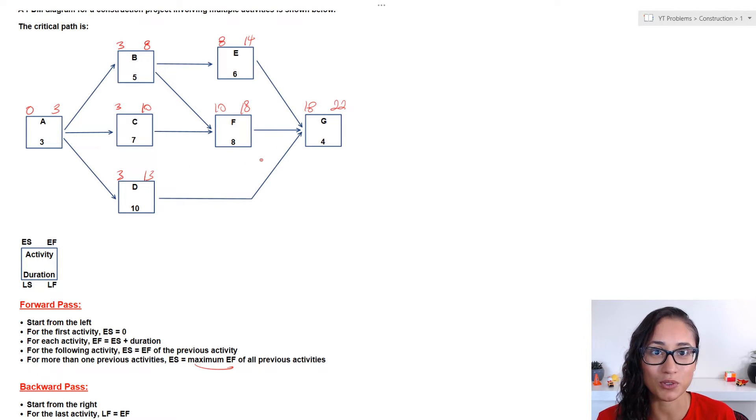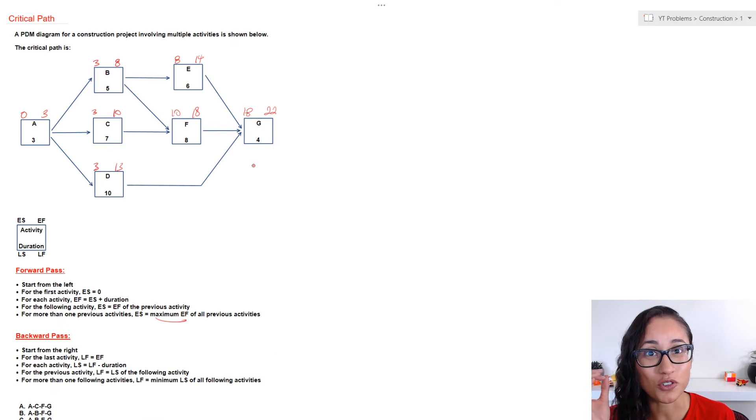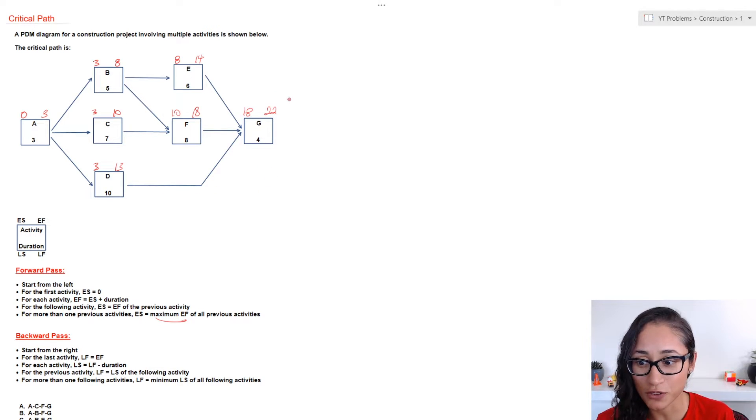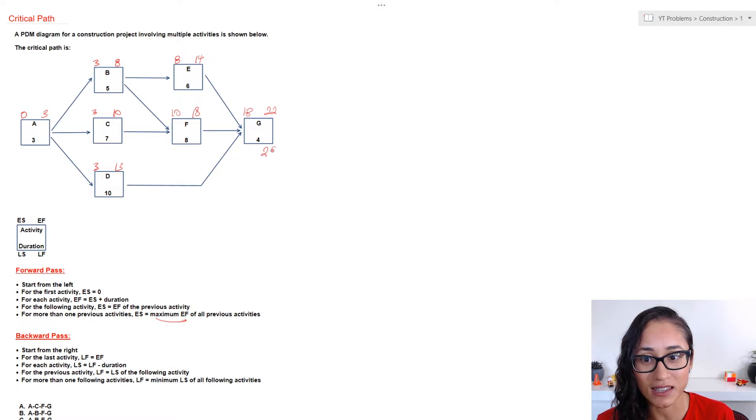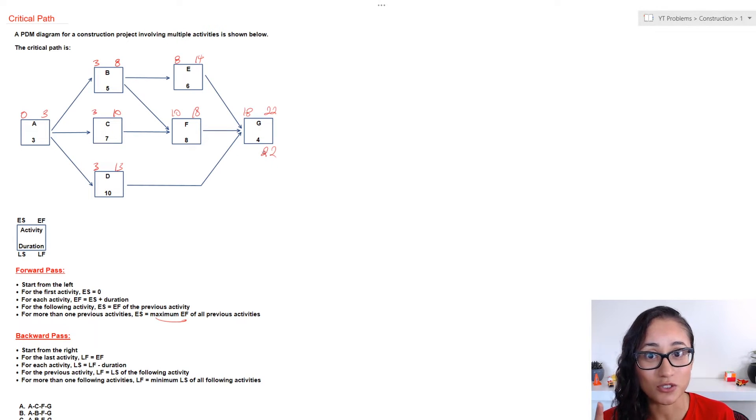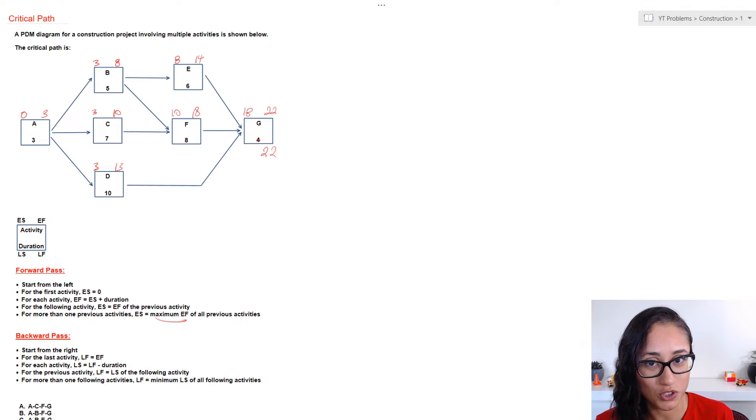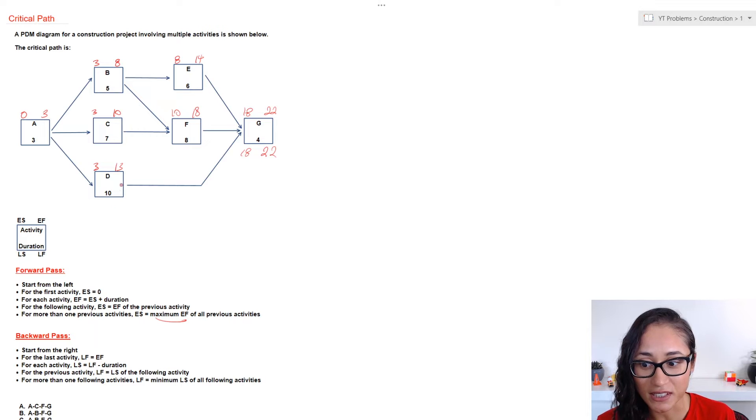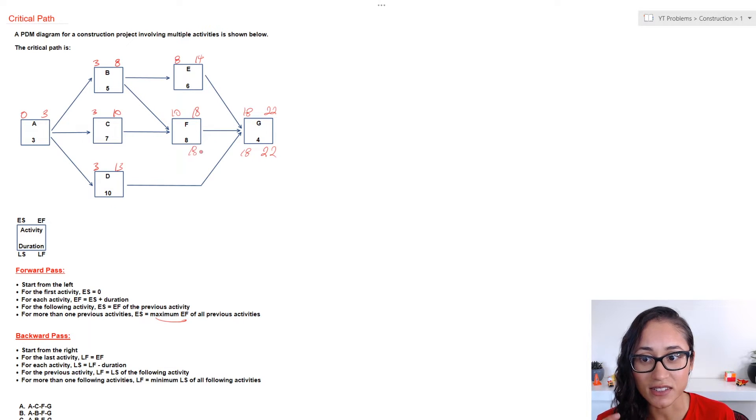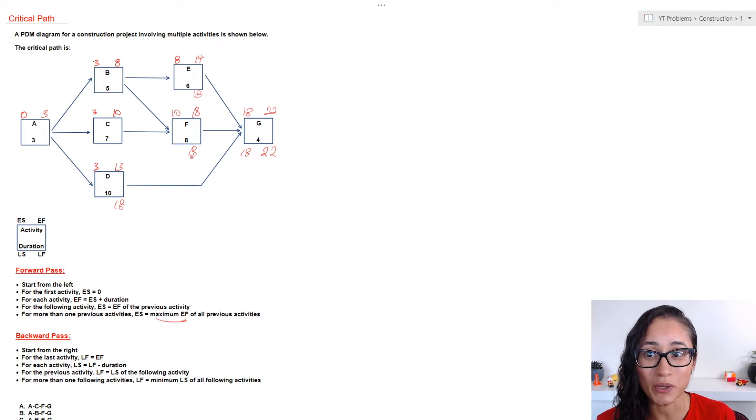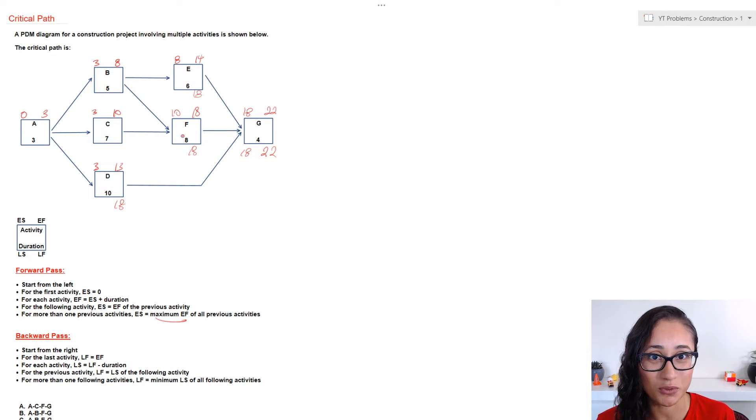Now, let's do the backward pass. So, for the backward pass, we're going to actually start from the right, and the early finish is going to be the same as the late finish. Now, to calculate for the late start, we're going to do twenty-two minus duration, which is four, and so that's going to give us eighteen.